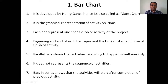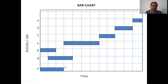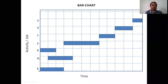The beginning and end of each bar represent the time of start and time of finish of that activity. Along the X axis we take time in days. For example, cleaning of site is taking three days — so the bar starts and ends over those three days. The length of the bar shows the total time duration required for that particular activity.